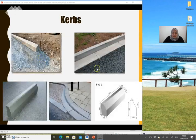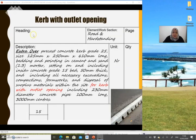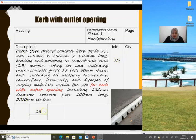The description also includes setting on in-situ concrete Grade 15 bed, including all necessary excavations, compaction, formworks, and disposal of surplus material. The unit of measurement is in meters. It is good practice to state the exact location where the kerb will be placed on site. If you have a kerb with an outlet opening, this must be mentioned as extra over and enumerated in numbers.